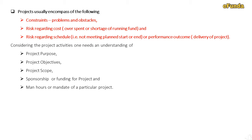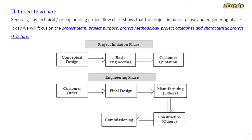We will see further details of all these project-related activities. Project flowchart: generally, any technical or engineering project flowchart shows the project initiation phase and engineering phase. Today we will focus on project team, project purpose, project methodology, project categories and characteristics. The project initiation phase includes conceptual design, basic engineering, and engineering phase, followed by customer order, final design, manufacturing by vendors, construction by the construction contractor, and finally commissioning.